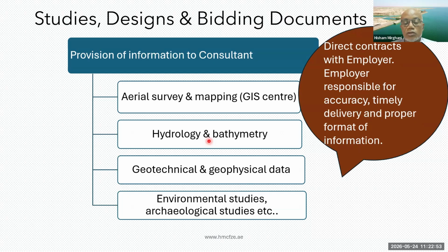And you need to make a decision whether to do this via direct contracts or to include this in the scope of the consultant. And really, from our point of view, it was better to do this via direct contracts, because then we could gather all this information for the various projects on an integrated basis without having to do it separately for separate projects, because the projects would be distributed amongst various consultants, depending on the procurement process.